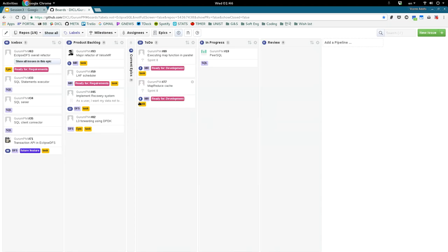So here we have a Kanban, and so we have this for my project, and then we have the product backlog, and those are tasks or user stories that we have to implement. So this part is like long term. We didn't decide when we want to implement it. We cannot decide it in the roadmap, but it's very loose. And then this part is for this iteration, this sprint. So it works like that.